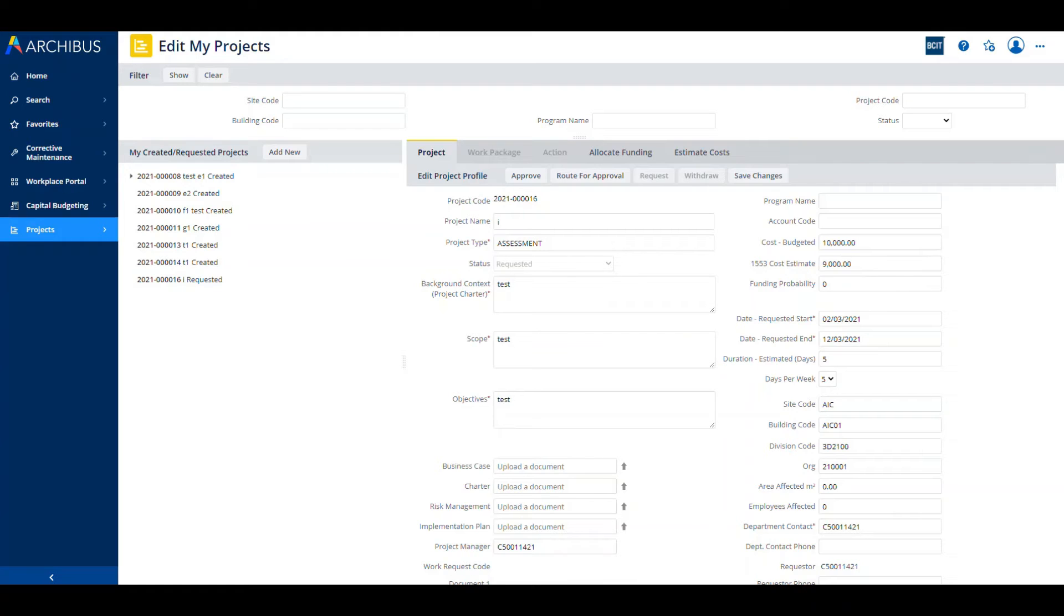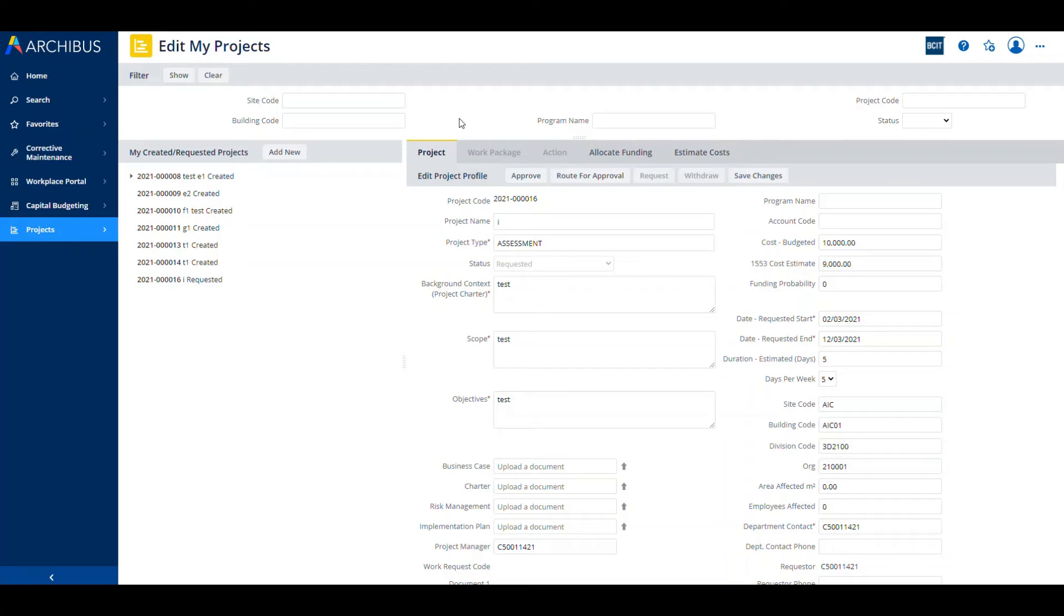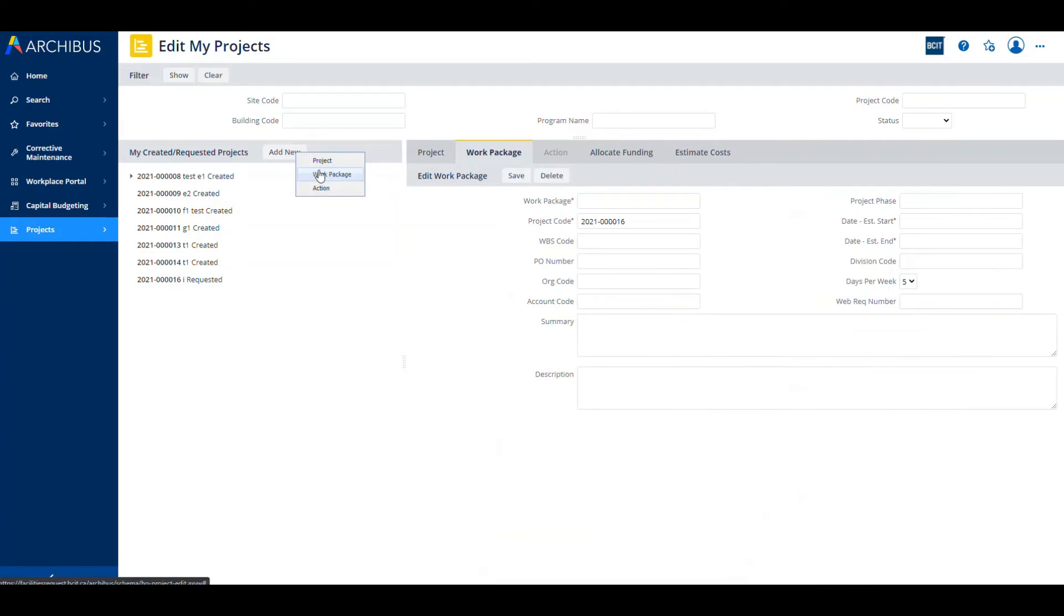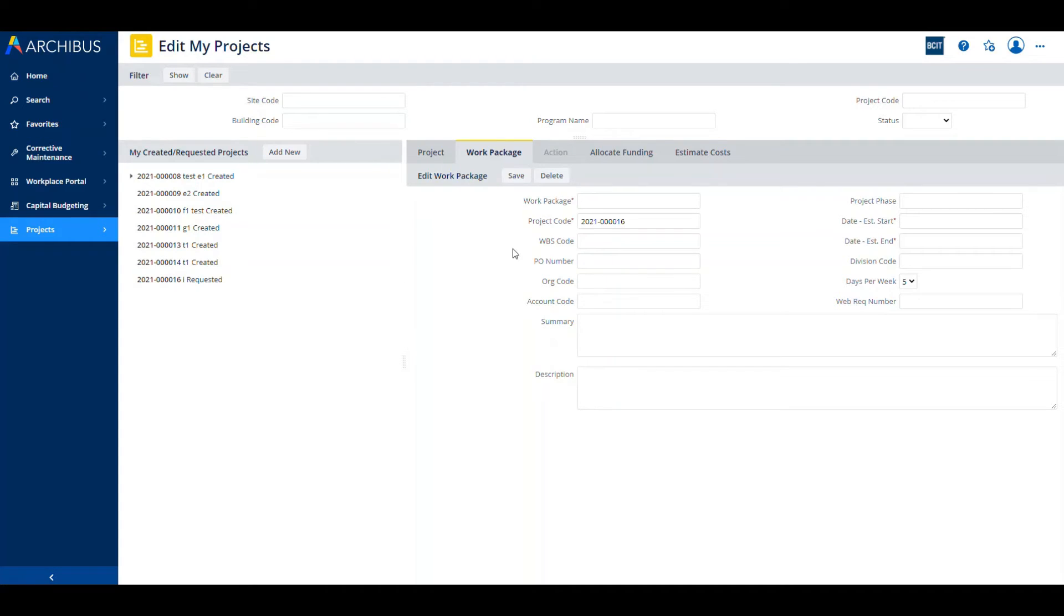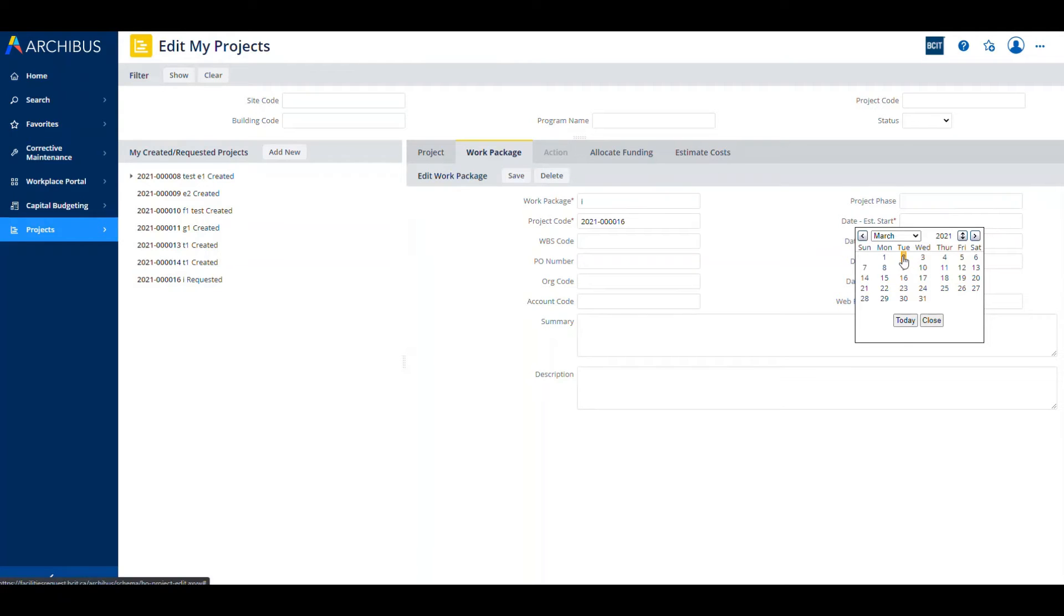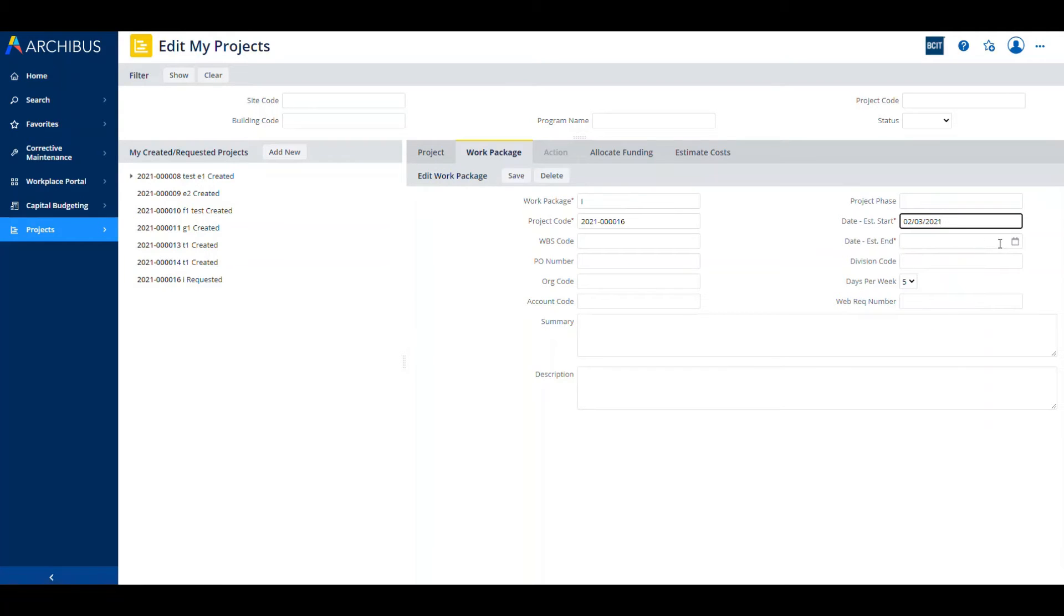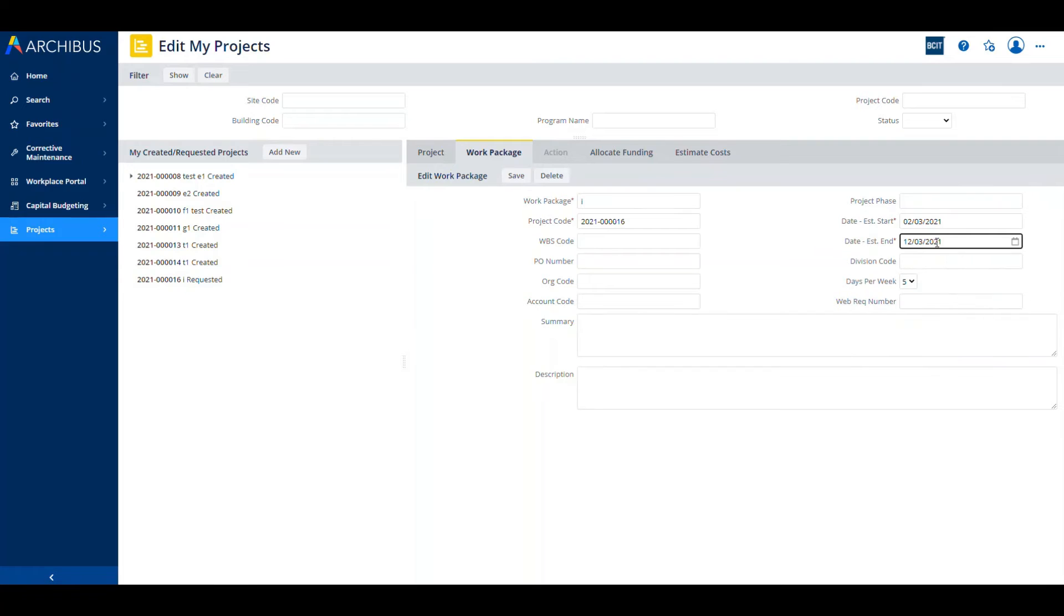Before we move along to send this off for approval, we have to add a few more pieces of information. We talked about the project hierarchy, that the project has a work package in it, and a work package has actions, also known to many people as tasks within them. So we're going to add new, and now we're going to add a work package to our project. You can see in the left-hand side here that our project has been requested, and it is right now just waiting for our work package information, which we're going to enter. I'm going to leave the start date and end date by choosing the calendar pickers there. We've got our core information in for our work package, so we can now press save on that.